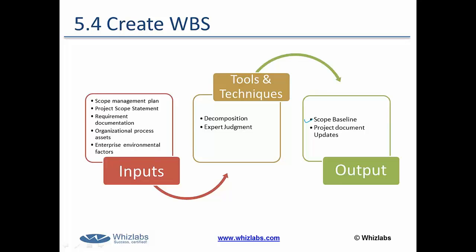This process is all about breaking down the entire project scope into smaller and more manageable components called work packages. This is done with the help of a technique called decomposition, along with expert judgment. As mentioned earlier, never try to memorize the inputs, outputs, and tools and techniques — just ask yourself what you need to break down the scope.